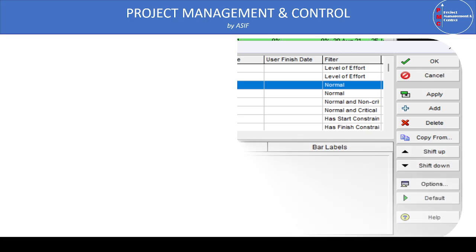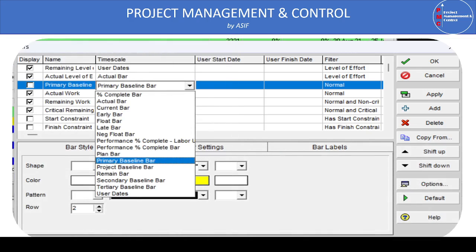Here is a screenshot from the bar dialog box. You can see the primary baseline, project baseline, secondary, and tertiary baselines are all listed. However, the project baseline will not appear by default in the name list, so you need to add the bar for the project baseline and then define the filters and other parameters to show it on the timescale.